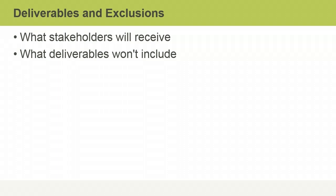You would only list product exclusions that might naturally be expected as a feature of the product. For example, if you are creating brochures, you may note as an exclusion that the brochures will not be printed in color. The decision to exclude color printing may have been made in order to meet a cost constraint. As time goes on, we may forget conversations we had regarding product features, so by noting exclusions, you may avoid misunderstandings later.